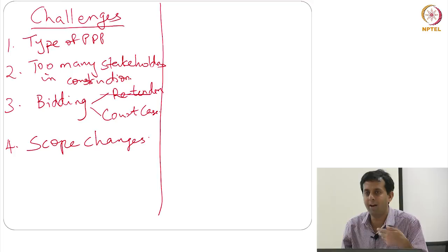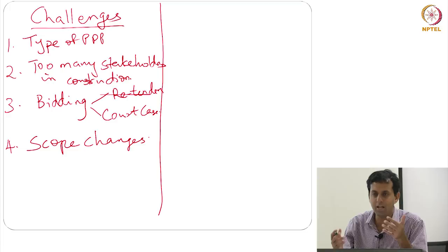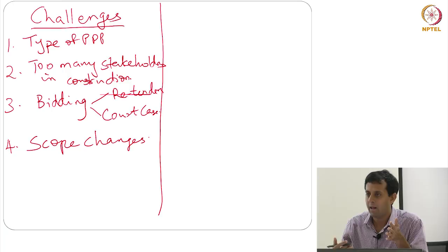So you levy a fee, that's the UDF, the user fee that you levy. So you tell these guys, look, okay, fine, you spend another 1,000 crores, you want to get those 1,000 crores back or whatever number it is. Let's start levying a fee on the users, so let them pay a little bit extra to go through Delhi. That money accrues to you.